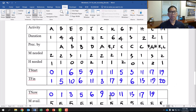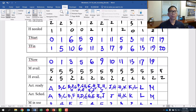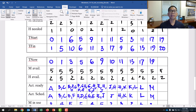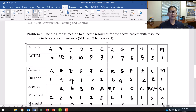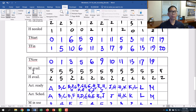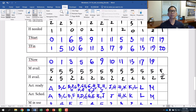Continue with the resource constraint rows. The problem gives you 5 masons and 2 helpers available. So enter 'mason available: 5' and 'helper available: 2' repeated across all columns. That completes those rows in the table.